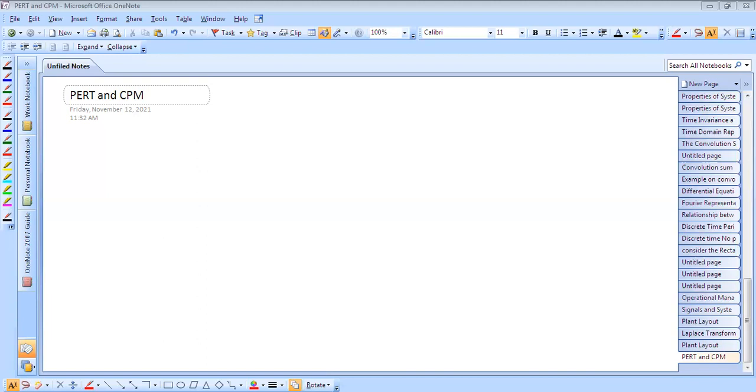Now, once you break the activities or tasks down, whatever the project is, we have to first break it down into individual tasks and activities. We have to decide whether each will be performed on a simultaneous basis or in sequence. A network diagram is constructed, which presents visually the relationship between all the activities.